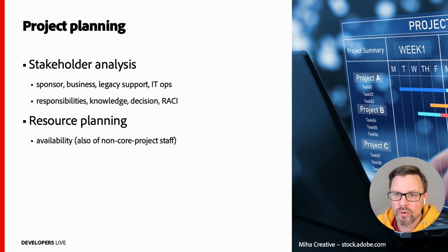Resource planning is super important. It is not sufficient to name and assign the roles. It also must be ensured that the people assigned have enough time set aside from their day-to-day job.